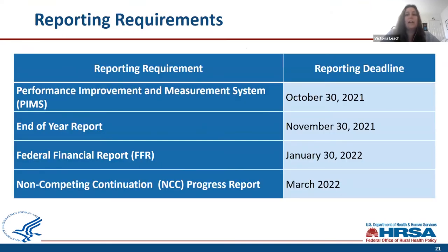Here are your upcoming reporting requirements. To complete the FY2020 year, you have a Performance Improvement and Measurement System (PIMS) report due October 30th, an end-of-year report due November 30th, and a Federal Financial Report (FFR) due January 30th, 2022. You can then expect to see the fourth year NCC progress report coming out around the same time in March of 2022.